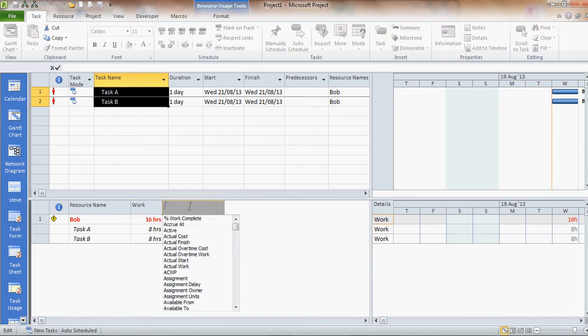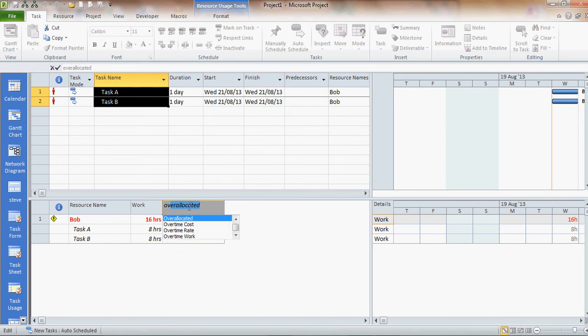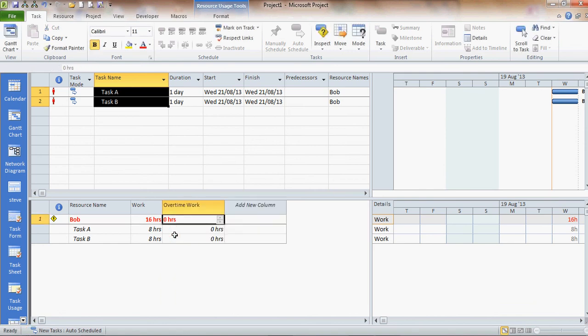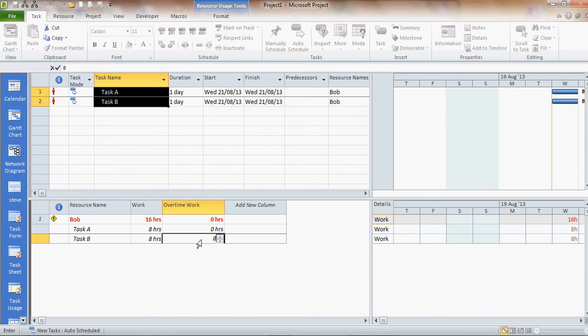I'm going to add a new column. I'm going to add overtime. So I'm just going to type overtime work column. And I'm just going to give task B 8 hours overtime. And when I do that everything goes black.